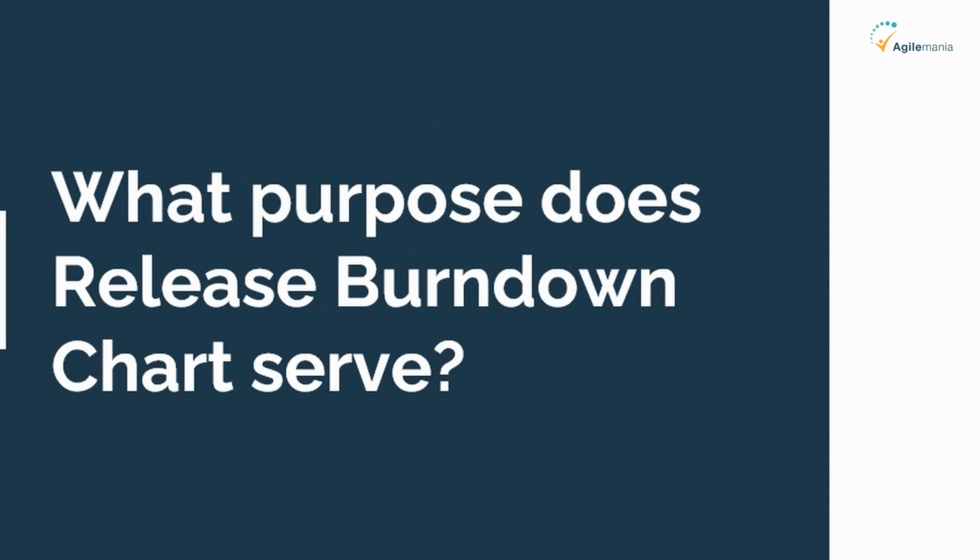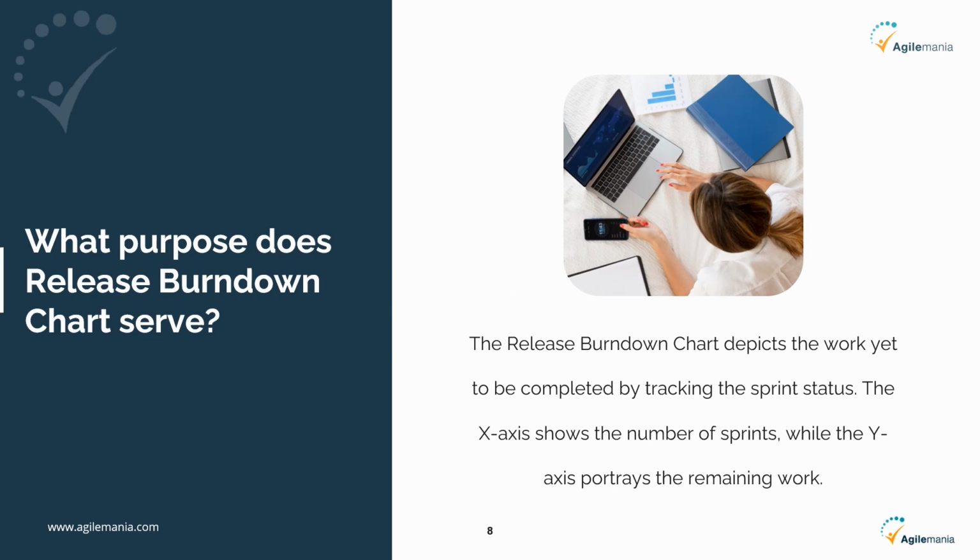What purpose does the Release Burndown Chart serve? The Release Burndown Chart depicts the work yet to be completed by tracking the sprint status. The x-axis shows the number of sprints, while the y-axis portrays the remaining work.